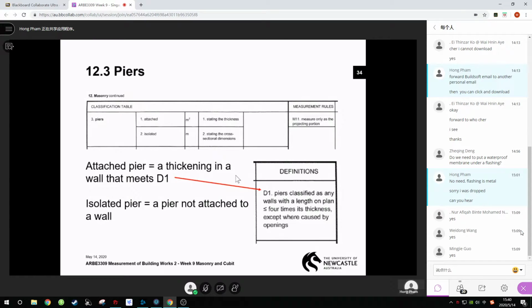So there's a bit more of a bill for you to scavenge descriptions out of, and I urge you to do that. In the industry, we don't sit down and write every description from scratch. In fact, we very rarely write descriptions from scratch. We usually pull another description from somewhere and ravage it, change it, edit it around. And that's why I've sprinkled through.